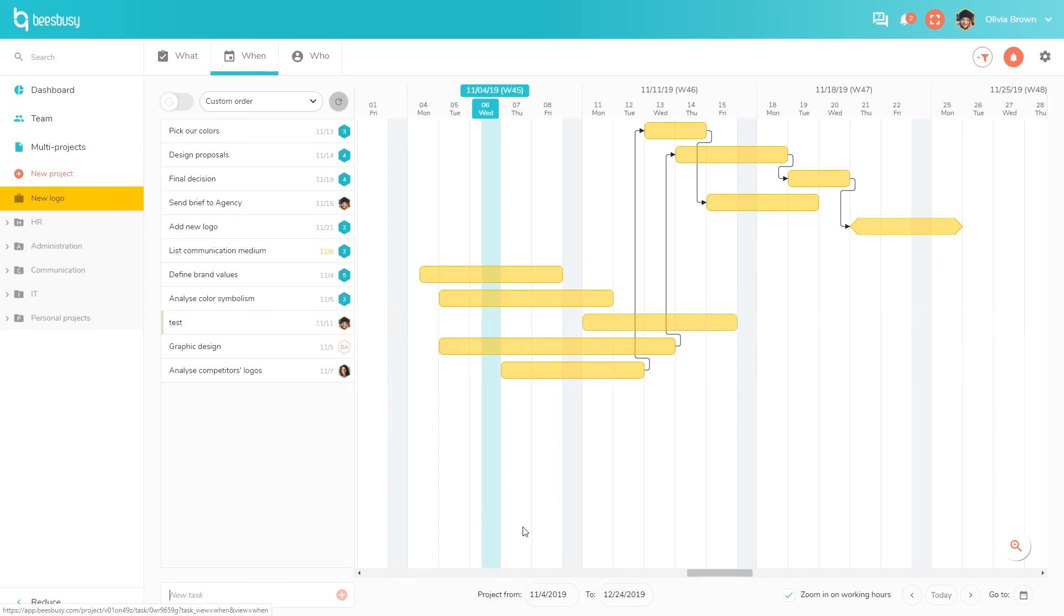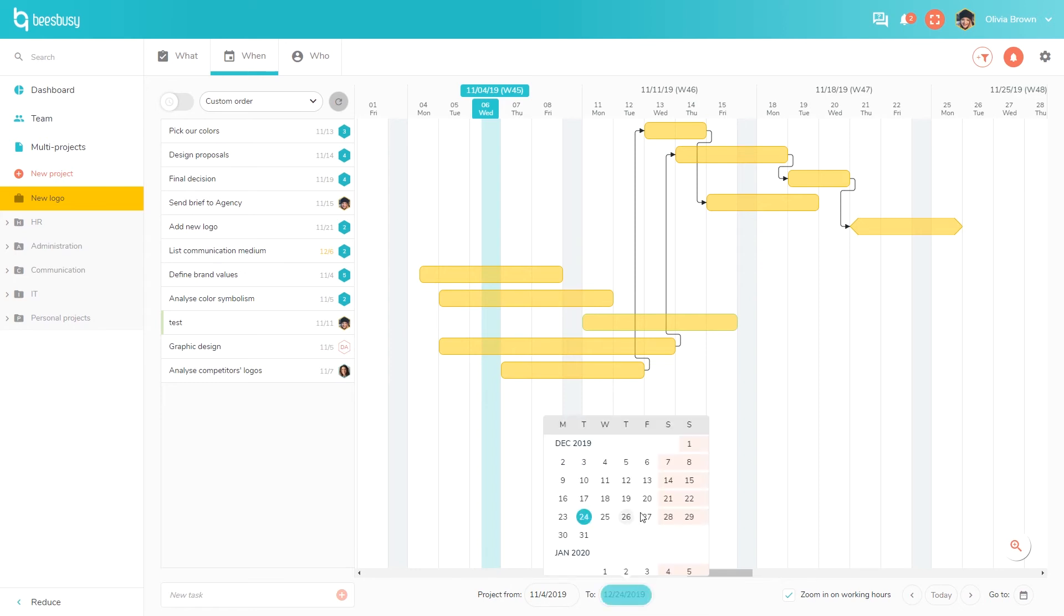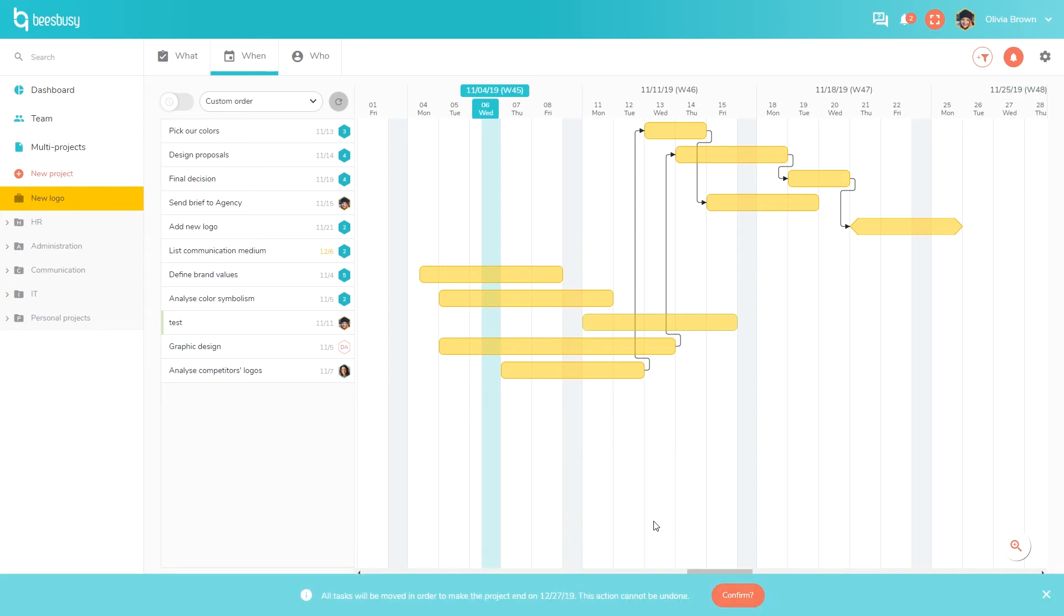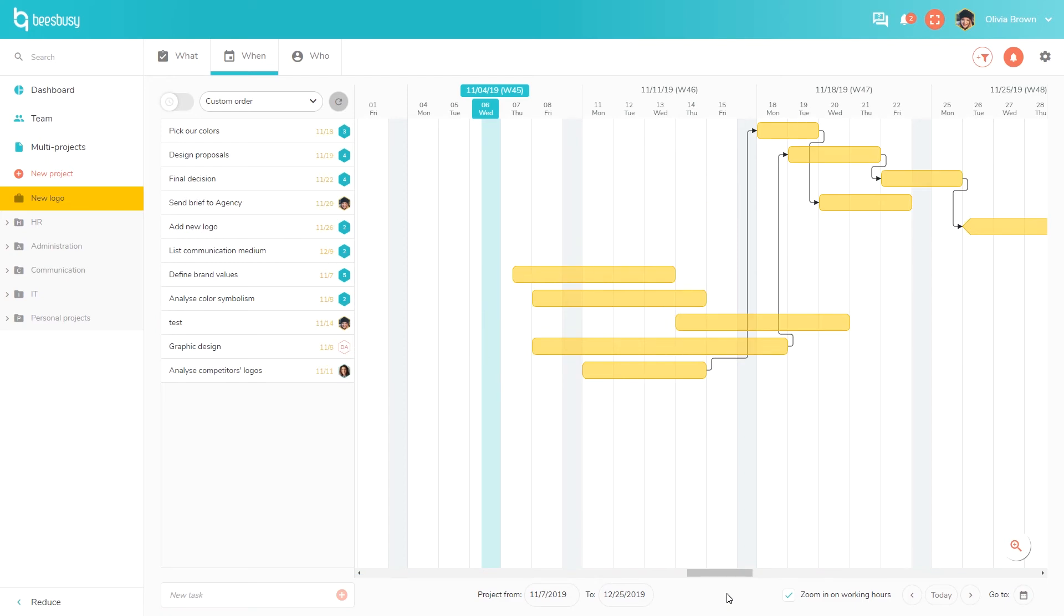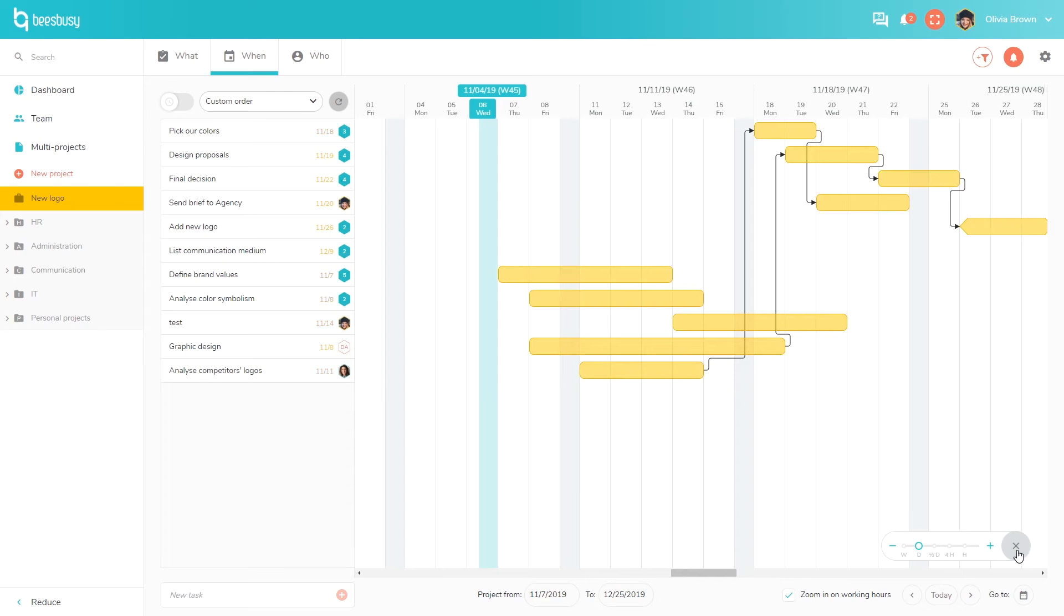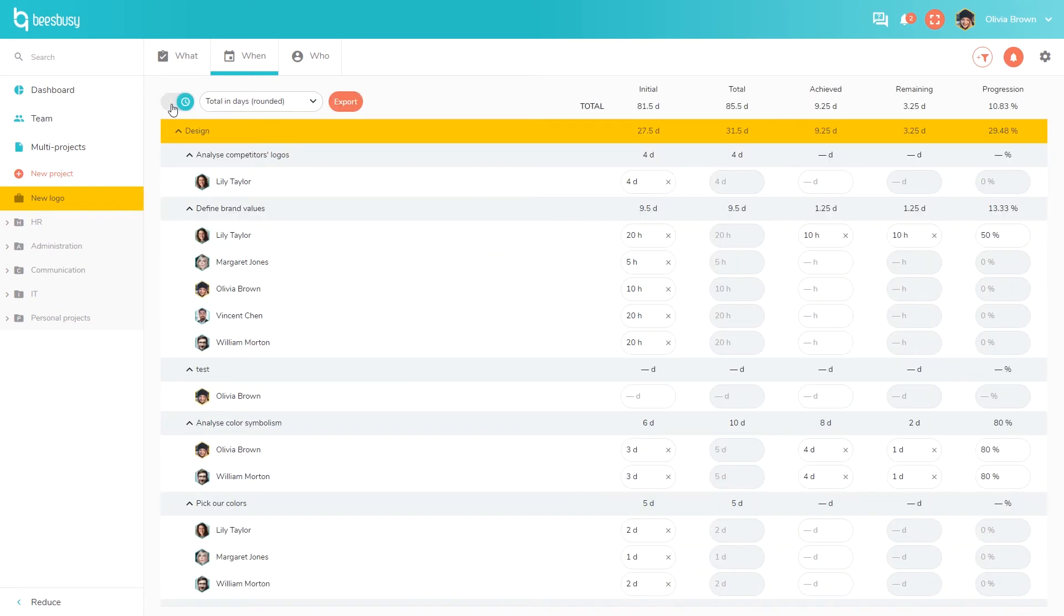You have here the start and end date of your project. You can use them to reschedule your whole project. For example, you can set your end date in order to match your deadline and see when you should start your project to finish it on time. You can set the level of zoom here from the hour level up to the week level, which allows you to display almost a whole year on a single timeline. If you are using time tracking, you can click here and you will find all the times for each team member for each phase, each task list and each task. You can also export this to Excel.